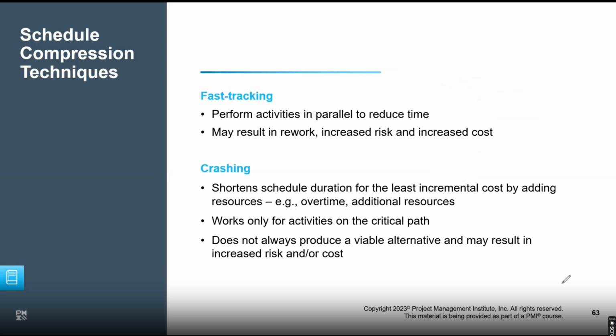This is bound to be taken. We don't have a choice. We will be taking it in order to avoid the baseline getting impacted. If no risk occurred as planned, then the budget reserved for those risks can be merged into the contingency fund, so they will still be there.